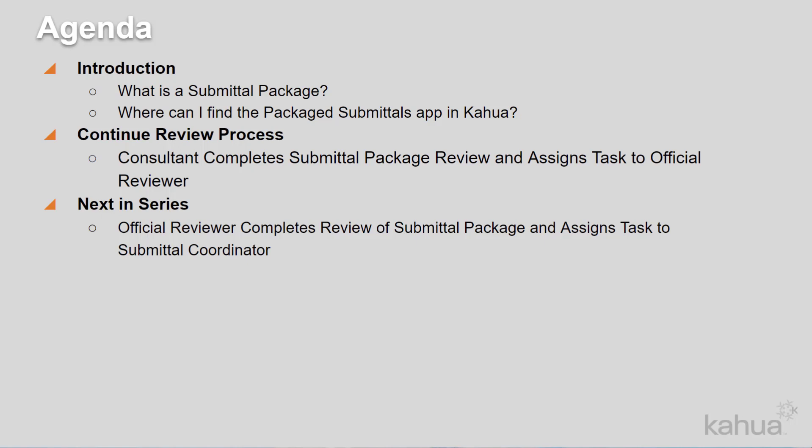Submittal items and submittal packages may be created by the submitting vendor and distributed to the official reviewer and optional consultant reviewers. The responses are filtered back through the official reviewer who shares the comments with the submittal coordinator who returns the reviewed submittals to the submitting vendor.